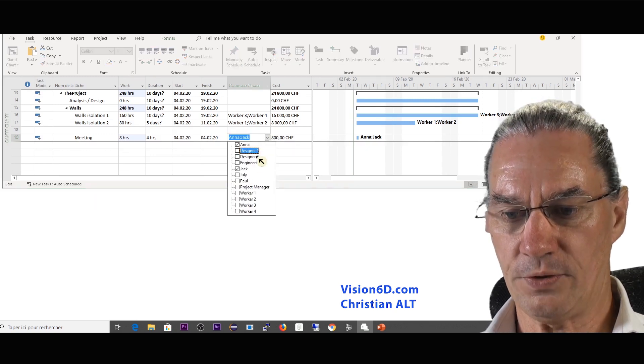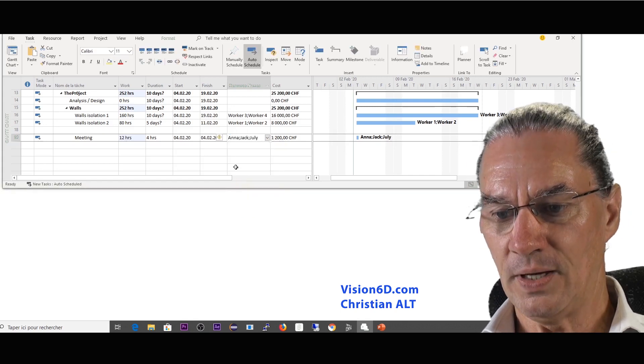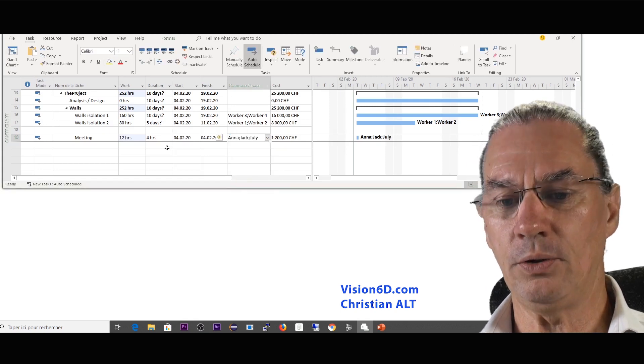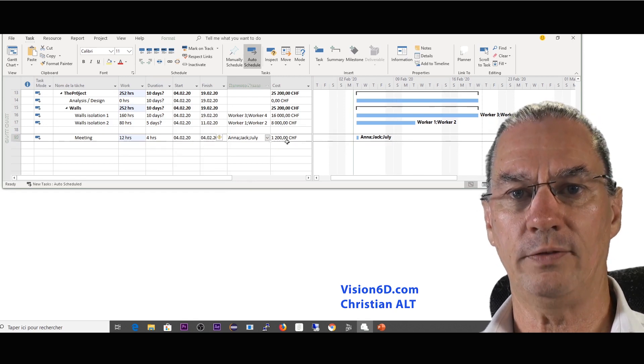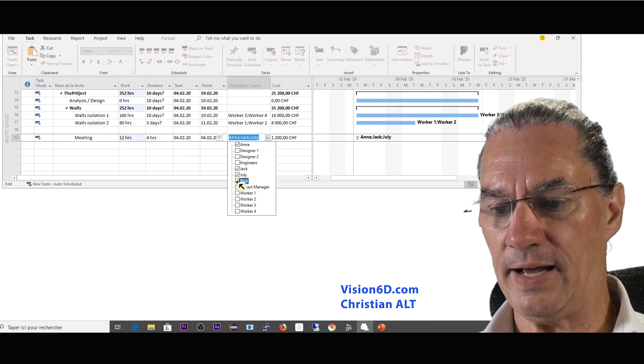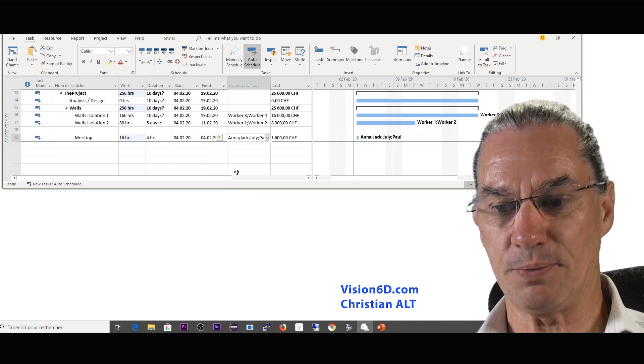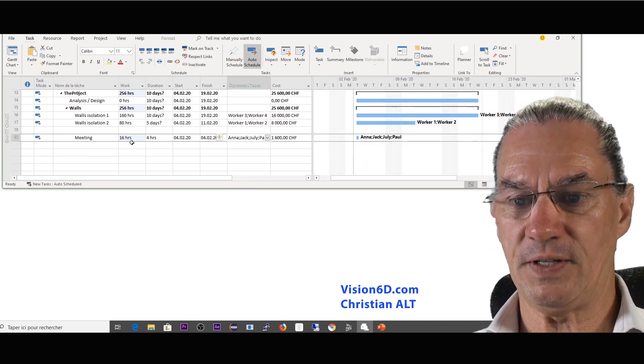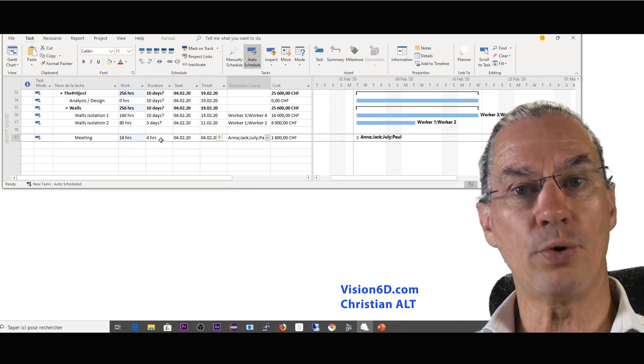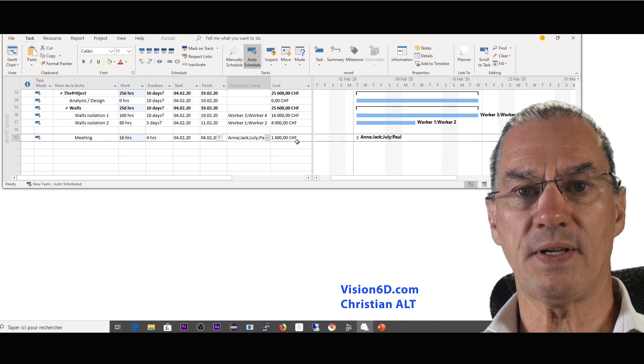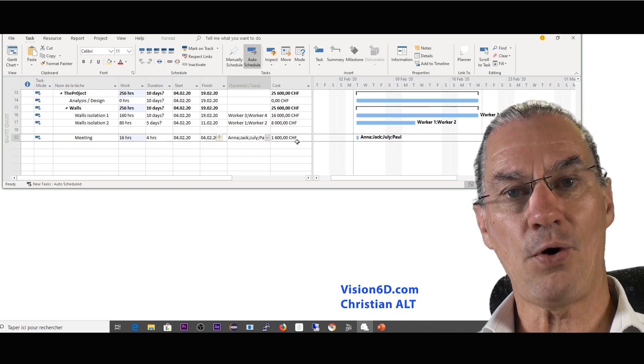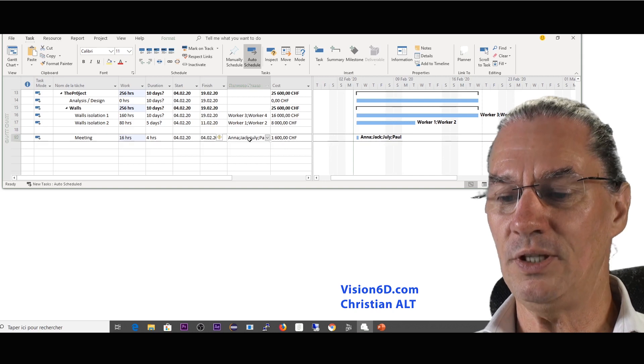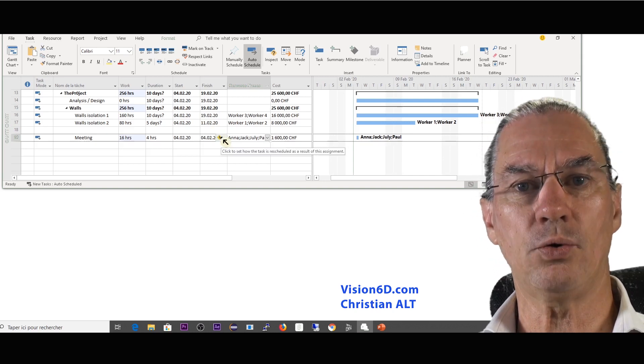So what is going to happen if I add also Julie? I think no big deal with this. It increased to 12 hours and now we have 1,200. And if now I go down and I add the last person which is Paul, no big surprise. The total work are 16 hours still in the duration of those 4 hours and we see that the cost has really raised up to 1,600. So we must pay attention with the meeting. By the way you see here that the costs are raising quickly.